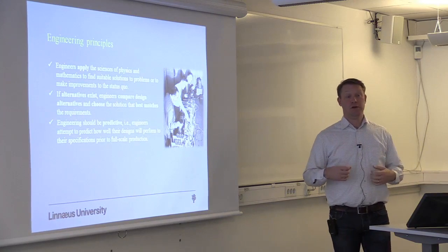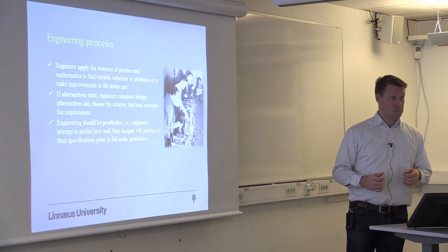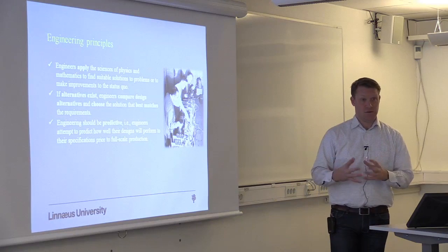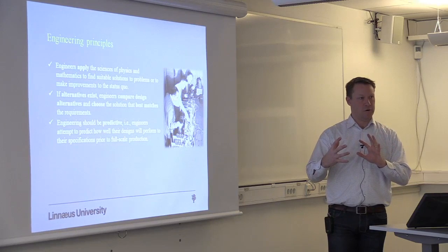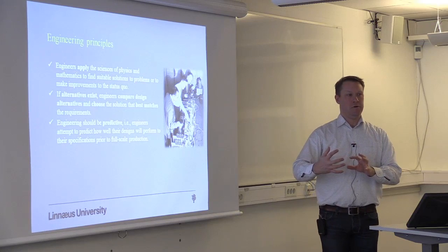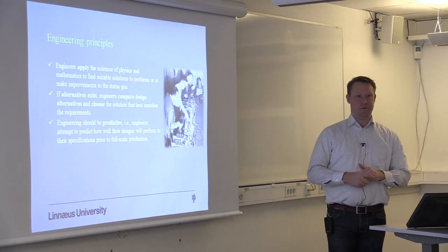So we want to avoid building the entire car before we test the brakes. We actually start with modeling the brakes. We test the behavior of the modeling, the software, and then we integrate the software with the hardware, and then we test the integration of that before we put it into the car.